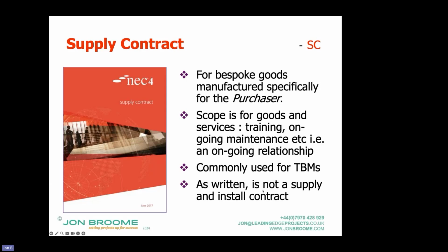As written, it is not a supply and install contract, though. And that for me is a downside of it. It presumes that whatever is manufactured is delivered to the site gates, and not installed. And that's an oversight. It doesn't take much, particularly if you're not in the UK, to adapt it to an install contract. But if it is in the UK and it can be considered a construction operation as defined by the Housing Grants, Construction and Regeneration Act, you would have to add in extra payment clauses and adjudication clauses.